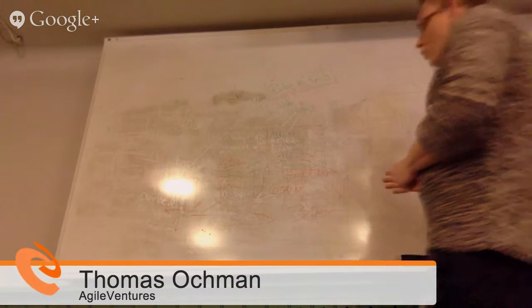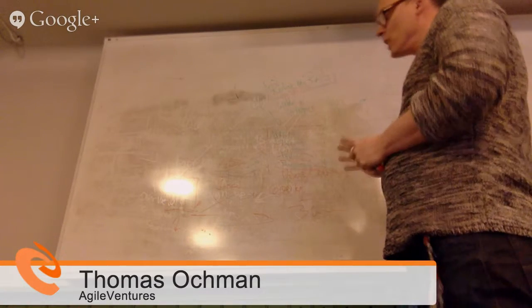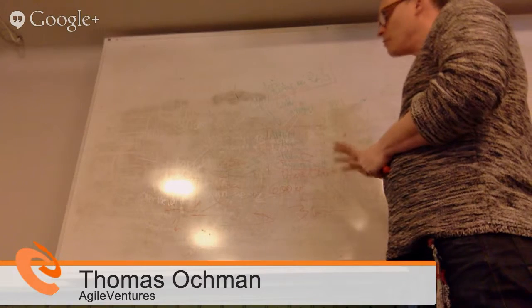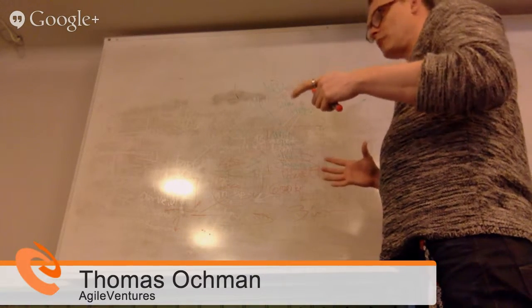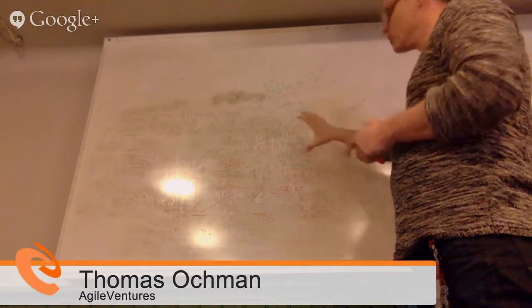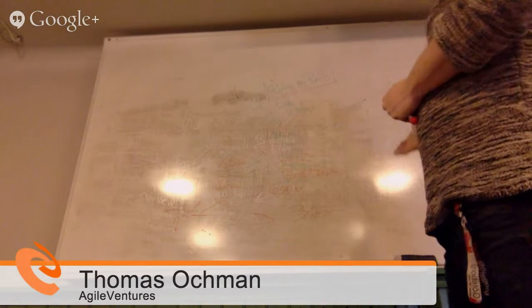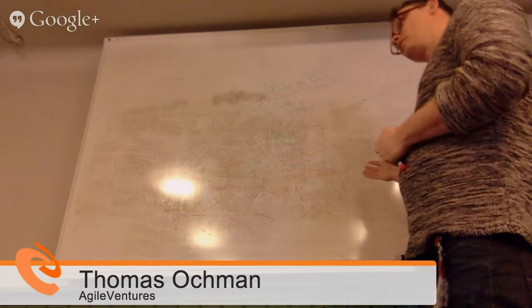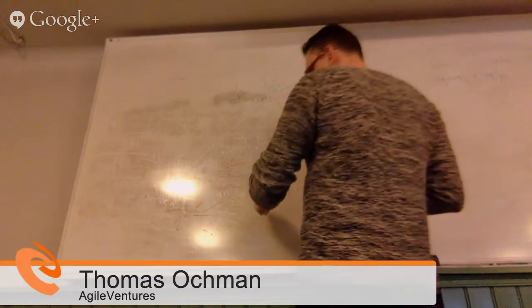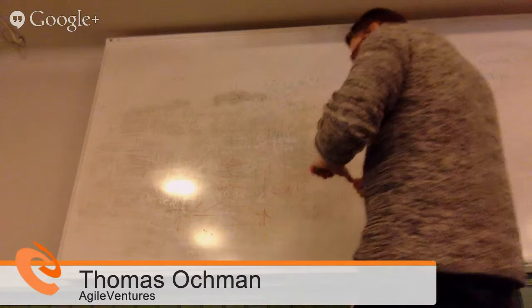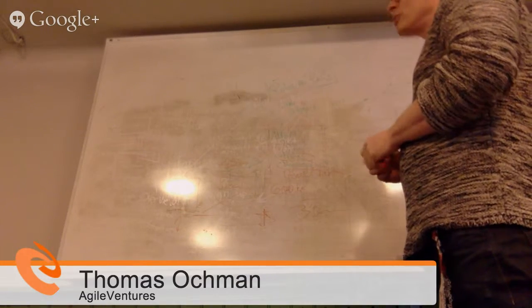And so what we said initially, and what I think is a good idea, is that we plan a 1 month sprint on this right now. So 1 month of engagement from us, and we'll see how much of this we can do in a month. And when we are nearing the end of that period, we do an evaluation, basically. And probably somewhere in the middle, after 2 weeks, we will have something that we call a sprint retrospective, which could be a good thing for you to attend.